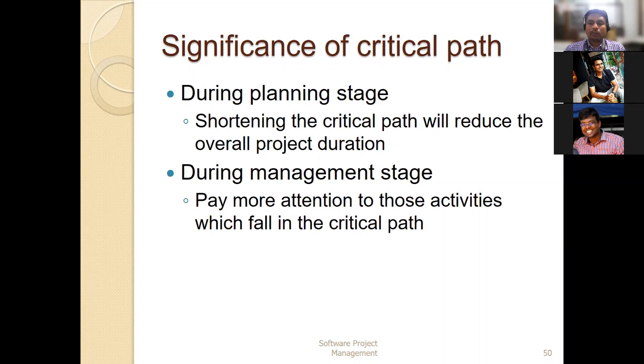And along with that, during the planning stage itself, we will be able to know which activities are going to have some cushion values, and that also we will keep in mind. Accordingly, we can start working on it. Based on that, we can put some alternate plan also, where if any critical event comes, we can find out whether it is possible to add some more resources, and through that try to complete the task earlier, which is possible. So these are all the important aspects when you go for using your CPM.